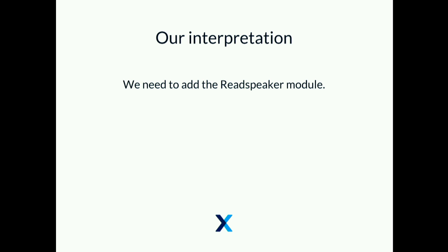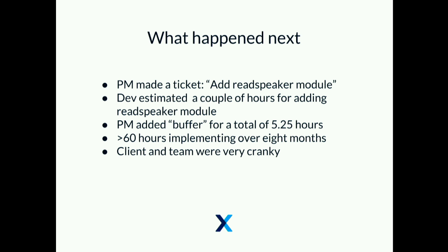This is how we interpreted it. If you've ever used Drupal, you can probably see where this is already going off the rails. The project manager made a ticket that said 'add ReadSpeaker module.' The dev estimated it at a whopping four hours. The project manager added some buffer, making it 5.25 hours, which is really oddly precise. And then eight months later, we had spent more than 60 hours implementing this feature. The client was really cranky, and the devs were really cranky, because this was like the never-ending story.